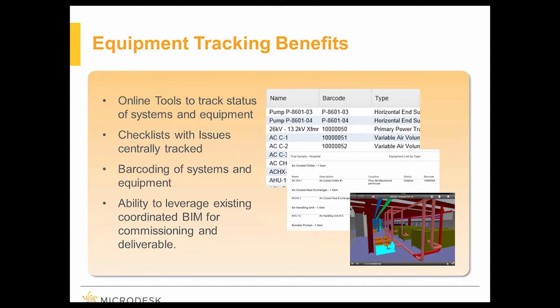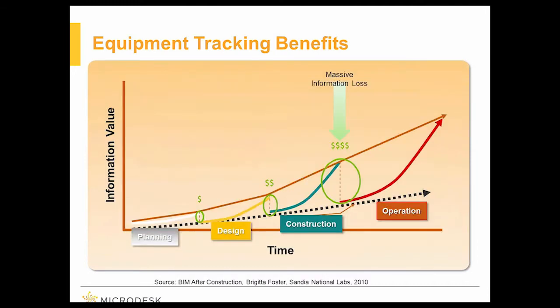And if you need to make sure that similar equipment is installed in the right location, this has barcoding as part of it. So I can actually scan that in the field and see the information and say, okay, this one needs to go here, this one needs to go there, and actually track that as it does that. And because we can connect to our BIM models, and some people hate that term, but still, essentially what I can do is load that up and view that on the iPad through BIM 360 Field and coordinate back and forth. So if I assign more data in there, that gets synced back to, say, Revit or Navisworks.